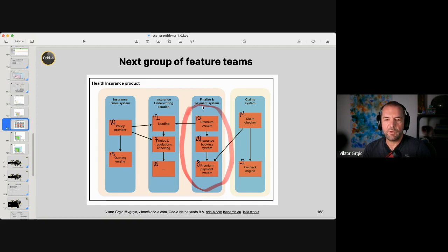And one way this is being done, by the way, is by shifting the teams. So there is easier cross-team learning. Teams from one area shift to another area, and because they are doing refinement and sprint planning together across teams, they learn from each other much easier. And in this way, they become even more cross-component.